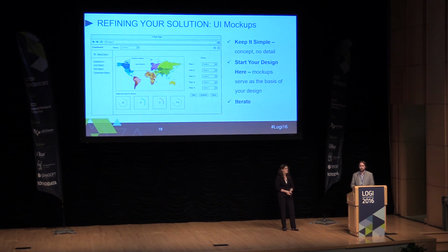And we also needed to figure out a roadmap for the features that we wanted to add, not just in a V1, but over the first maybe 18 months of the life of the product. And so that became the core document that we walked away from with, the blueprint. It really was a blueprint of these are the personas that we're going to cater to. These are the user stories that we want to provide through our product. Here's roughly when we think we can get those in place based on the level of effort and the technical challenges that we might run into. And we walked away with a plan that we're still running through today in terms of the launch of the product.